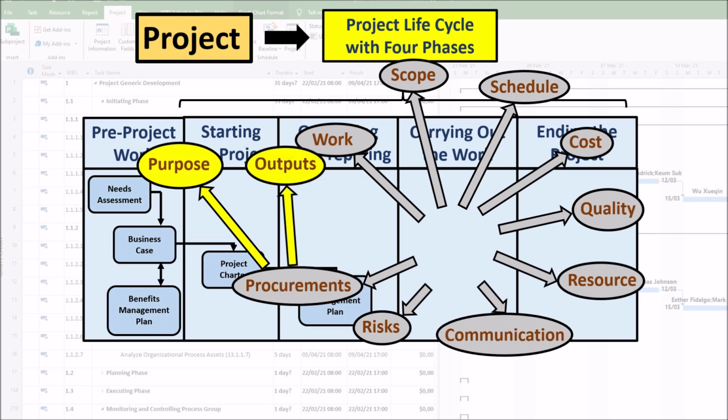Outputs. Some outputs of the procurement processes in this phase are selected suppliers. In this phase, one of the deliverables is the selected set of suppliers whose proposals have been approved as a result of a competitive bidding process. It is important to note that in the case of complex, high-value, and high-risk procurements, final approval must be given by the top organizational management.